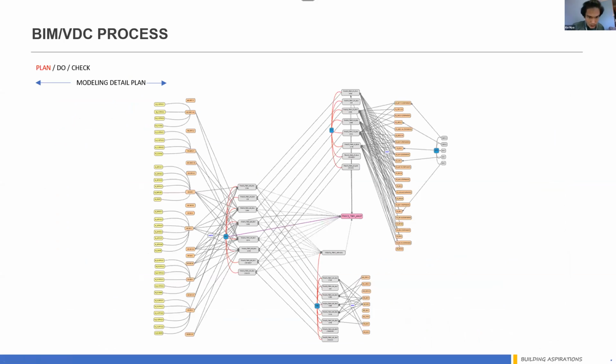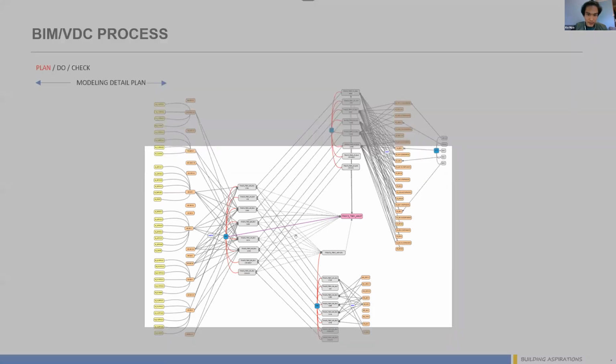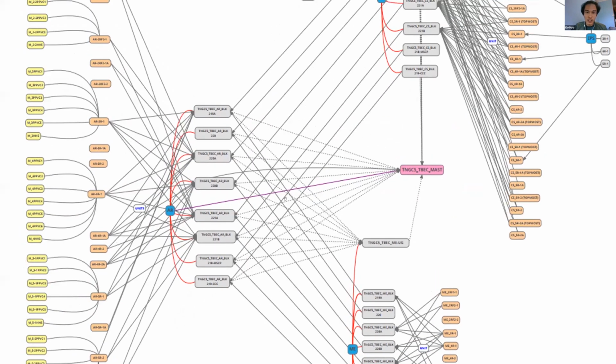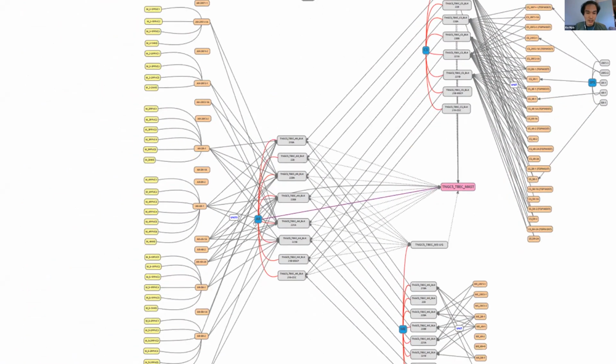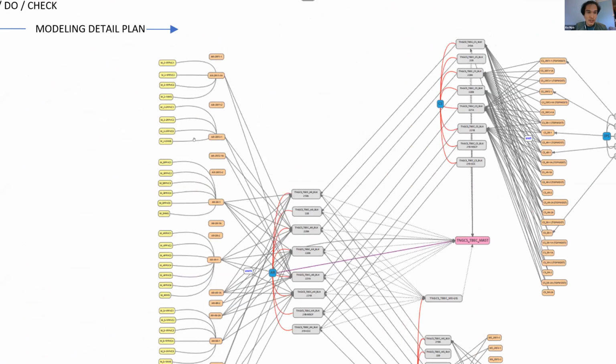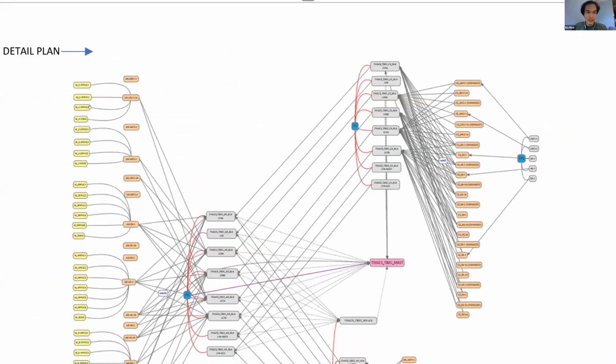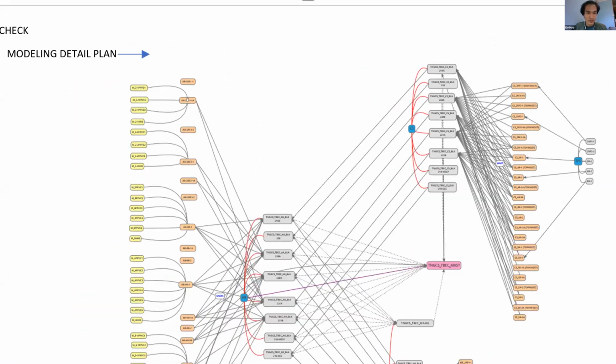And because we are doing VDC, we share our model and work together with subcon in one model. So we cannot keep changing our file name in the version. We cannot keep changing. So what we do is, first of all, definitely we will freeze this model structure. In this model, the Archi model itself has units. Units have PVC modules, which are definitely generated by IPS. Then we will link it to our units. Each module is linked to the unit.